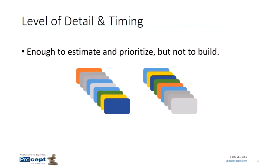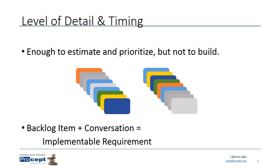That's a major difference from the large traditional document, where the whole point is: I produced a document, here you go, go build it, don't come back and ask questions — all the answers are in the document. The document is meant to be all of the communication related to those requirements. The backlog is very different: there will be a very large number of backlog items — it's pretty easy to get to 100 — but they don't contain enough detail to build, only enough to estimate and prioritize. At some point later, we're going to take that backlog item and have a conversation, and that is what will produce an implementable requirement. The backlog item is more just for tracking priority and estimate; we'll have a collaborative conversation with stakeholders when it's actually time to implement.